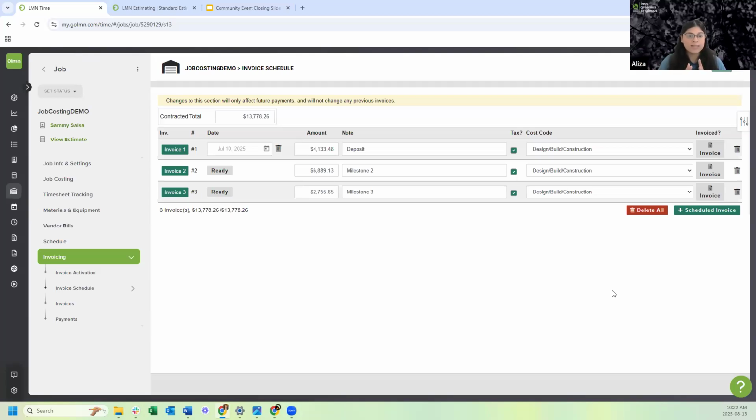The way job costing works in Element for invoicing is that as soon as you create an invoice, which means you click the generate button and it gets created, Element thinks this is going to be potential revenue. It's not going to wait 2 or 3 weeks until the invoice gets paid for, or all of that, to start showing it in the job costing tab.